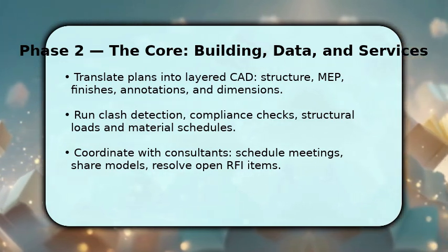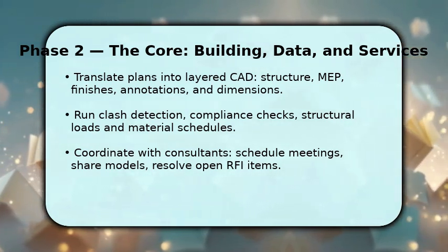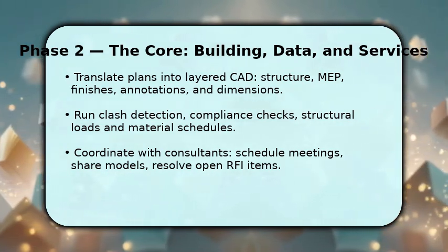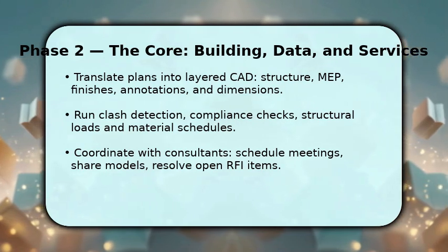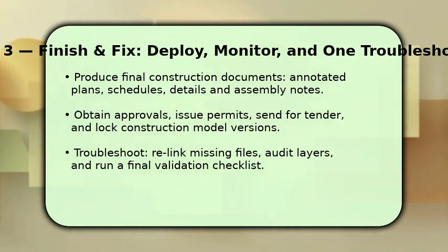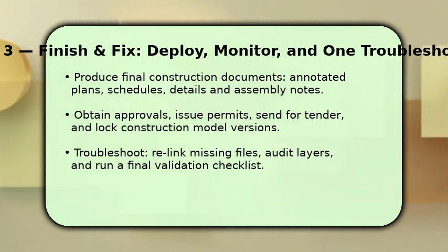Coordinate weekly, schedule short reviews, track open RFI items, and update the model immediately after. You finish by preparing the construction set, annotate plans, finalize schedules, add details and assembly notes that contractors will use. Once complete, obtain approvals and permits, issue the documents for tender and lock the construction model versions to prevent accidental